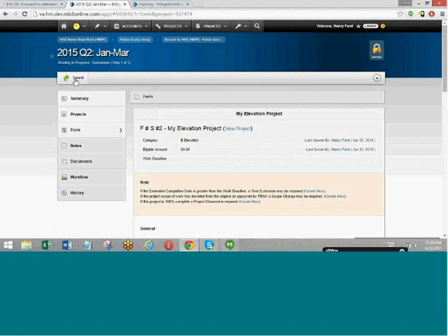Just so you know, for as long as the project is deemed open by FEMA, that project will show up on a quarterly report. You have to report on it. The rule is that if a project was open for at least one day within a quarter, it will show up on the next quarterly report. It will only drop off once it's closed. So that's how that works. Like I mentioned, the system auto-generates these quarterly reports. You don't have to worry about creating one. It will auto-create it for you and notify you that the quarterly report is due.